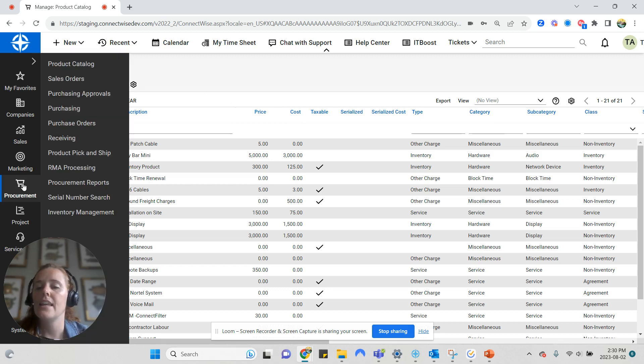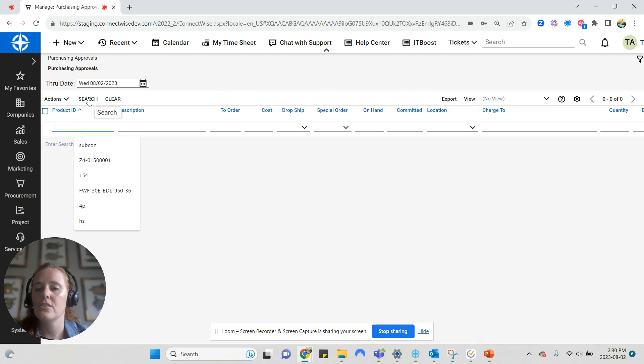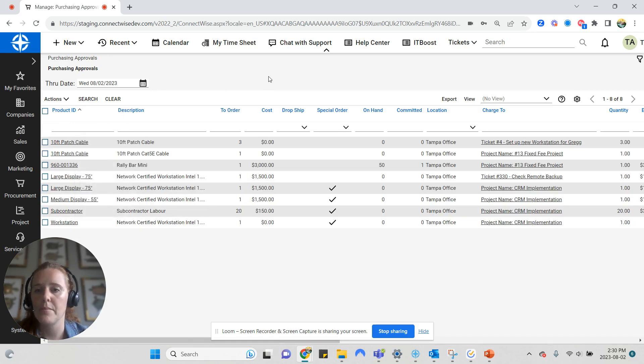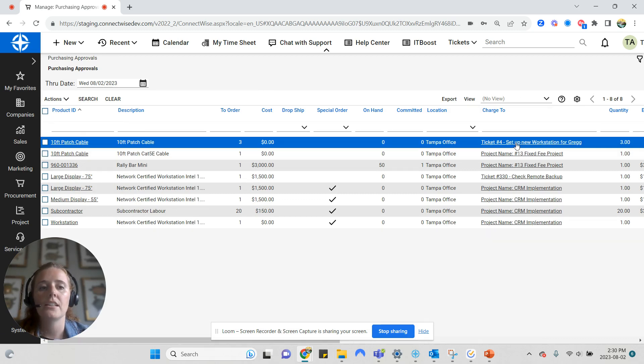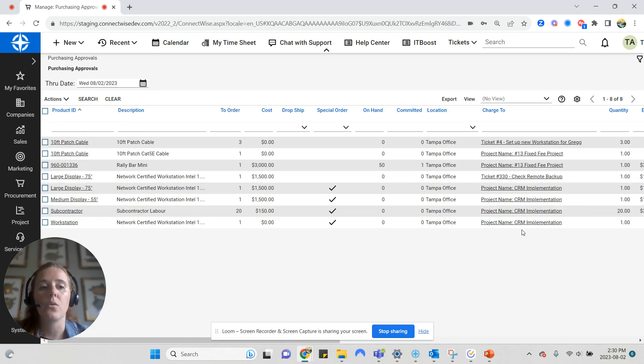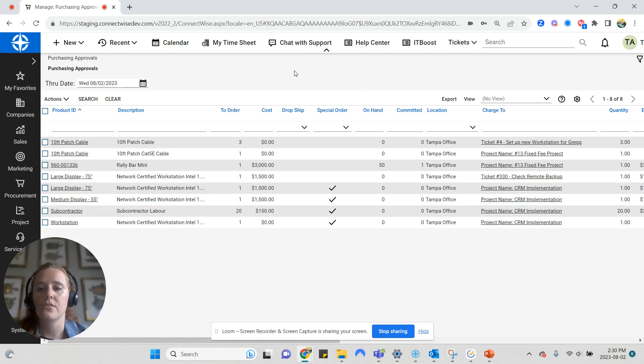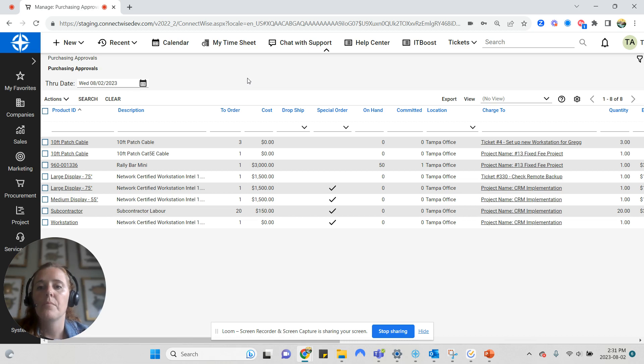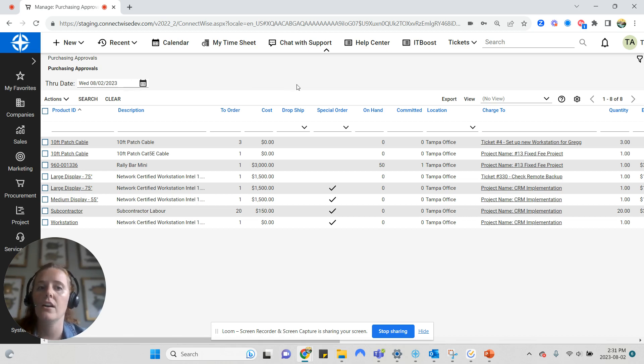Then we can go to purchasing approvals. If you have this turned on for your company, then you will have a two-step purchasing process, which means that as soon as a project, service ticket, or sales order is created, the product will first flow to purchasing approvals to be approved by a project manager or a service manager prior to going directly to purchasing. I recommend turning the purchasing approvals on for your organization.